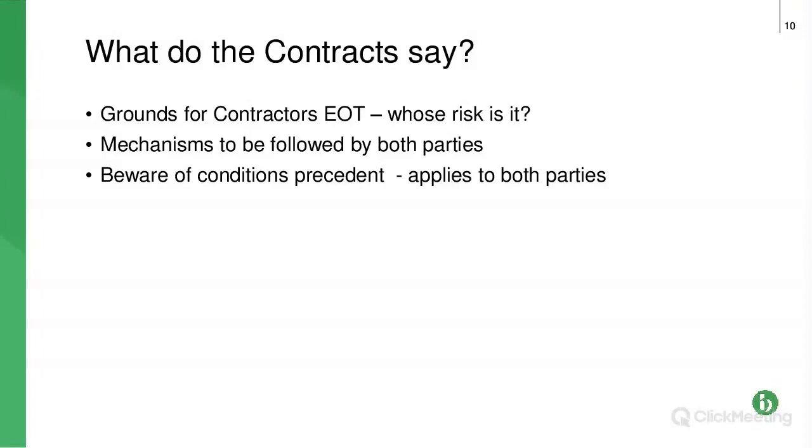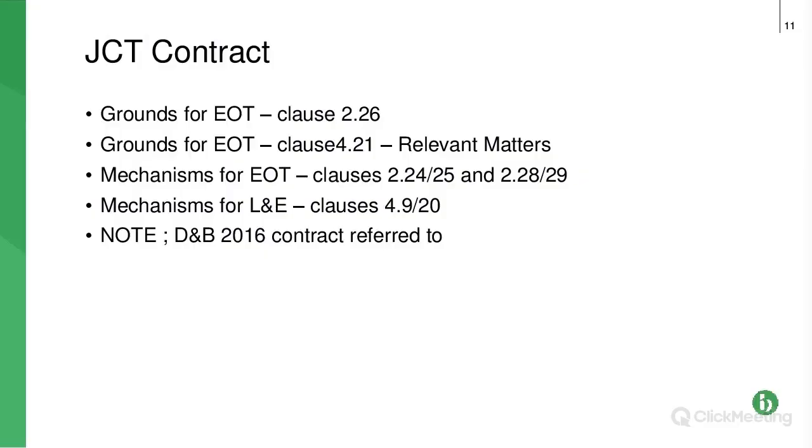Just note, beware of conditions precedent. I probably refer to these every webinar that we have. They're tricky little clauses, mainly impacting on you guys making these claims, because they effectively say that unless you make these claims within certain timescales, your right to extra time and extra money is zero. So, really, really tricky. So make sure you know what notices you need to issue and that you issue them on time.